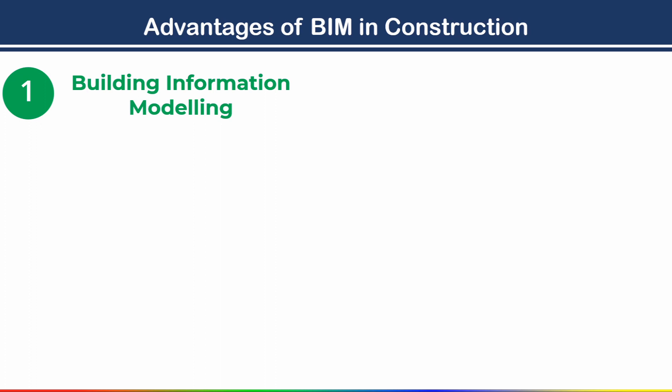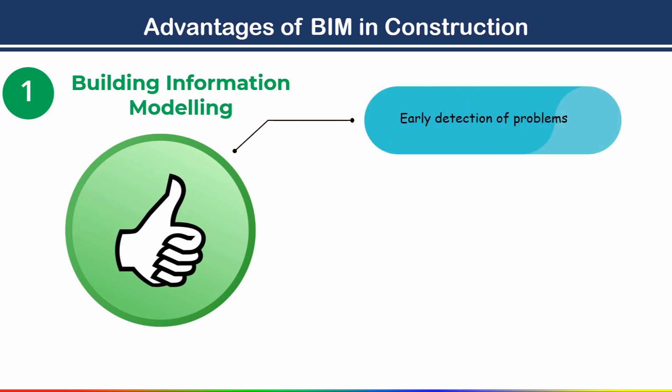What are the advantages of BIM? Building information modeling is quickly becoming one of the most widely adopted technologies due to its numerous advantages in terms of cost, safety, and efficiency. The first advantage is clash detection. Conflicting elements in a design are identified during the modeling phase, preventing costly changes during construction. You can easily detect problems with the help of the BIM concept.